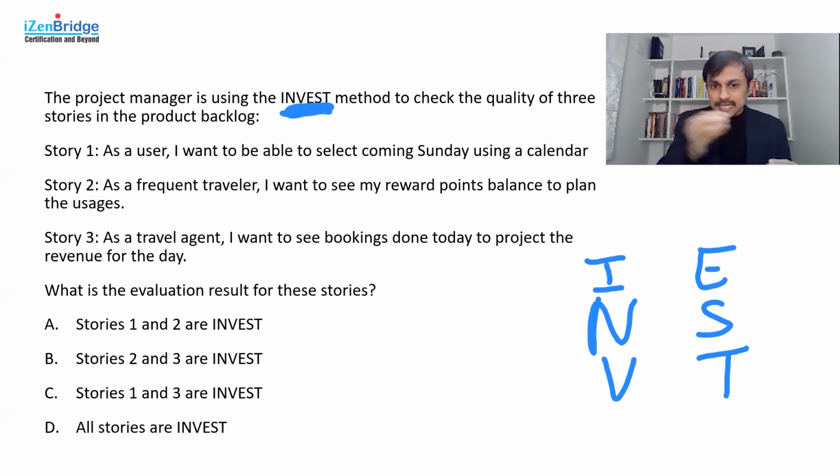A set of your project team, the team which is developing it, come together and estimate the user story, and they need to have their definition of small, which means it should fit in a given iteration. Now, just by looking at these user stories, it might be very difficult to talk about estimatable, small, and all the elements, because they are very specific to a particular team. But from looking at them, we can identify which ones are the good user stories.